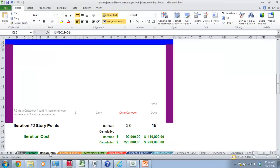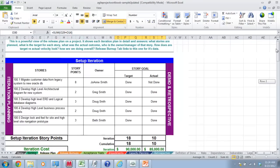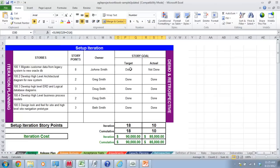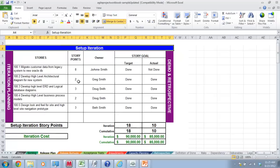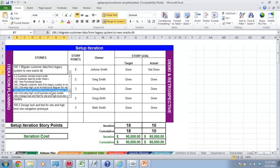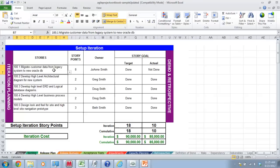From release planning, you should have your backlog created, somewhat prioritized and ranked, and sized. You may also have something like a release plan showing a setup iteration — what we call Iteration Zero. After release planning is done, iteration zero addresses non-functional, foundational work before execution begins: getting some training, setting up environments, getting basic items done so that Iteration One can actually succeed.